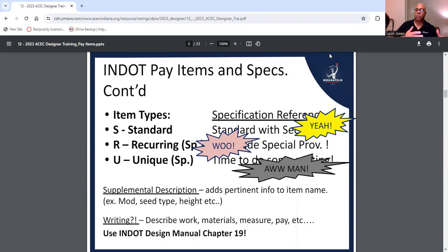Let's say the item number is 600-11111, 5 ones after it. Now, if I wanted to make a modification or make it unique, in Pennsylvania, we used to put a 4, so that item number would be 4600-11111. The 4 indicates that it is unique to the job.